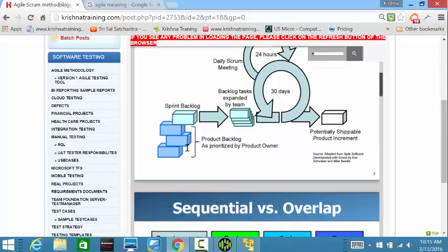All the six people will finish first. And at the end, after 15 minutes, once the status is completed, let's assume three people have said that there are issues and they need a breakout discussion. They will identify whether that breakout would require 30 minutes, 1 hour, 2 hours, or just a 10 minute discussion. They will say how severe it is and how much time it would take. If it is a quick discussion, they just need to get something quickly clarified.